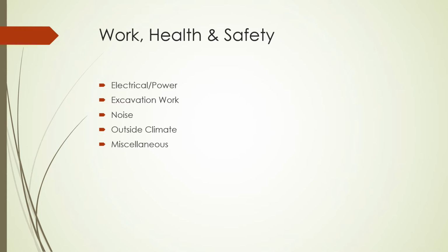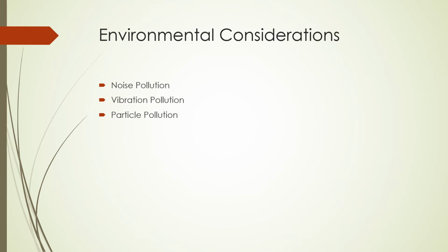Excavation work, whereby these risks can be dealt with by creating an emergency plan and also following the guidelines stipulated by clauses 304 to 306 of the Work Health and Safety Regulation of 2017. Noise, as over the past 4 years within New South Wales workplaces, noise has caused 10,000 injuries within the workplace. Outside climate, which can be further categorised into dehydration, heat stroke, heat rash, heat cramps and heat exhaustion, given Australia's harsh climate. And also miscellaneous, which can be classified as drug and alcohol abuse on site, and also given the current world climate, coronavirus. The linked YouTube video demonstrates the effect of noise and vibration pollution on site.